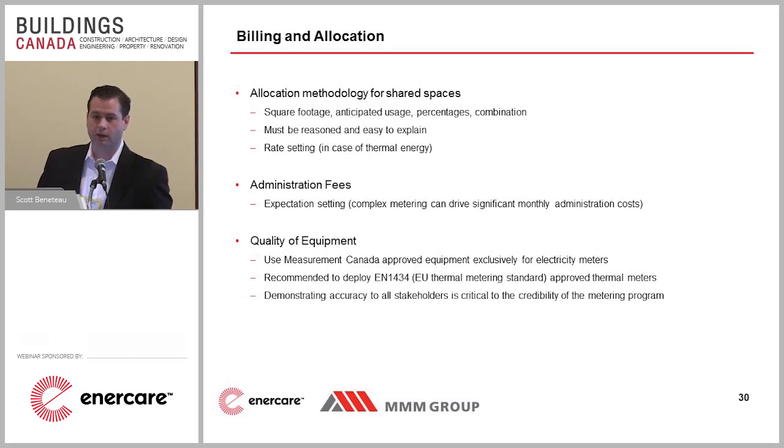But it shouldn't be an afterthought. As Omar walked through, the design and intensity of the metering can be very costly, particularly if you're doing it post-construction. Those costs can rise very quickly. So you need to set expectations with your customers and all of your stakeholders, what the metering is going to cost and the benefit that they derive from those costs.